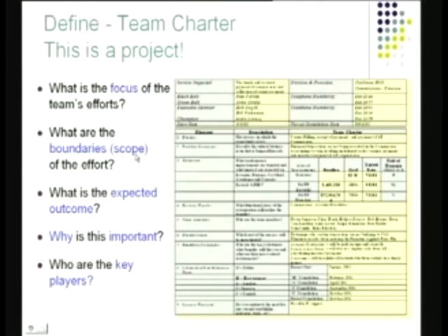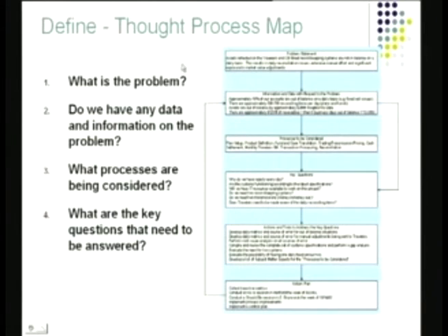That is, what will the project include, what will it not include, what are going to be the expected outcomes, and why this is important, what is really driving the motivation for it, and who are the key players who will be providing the expertise for it. And here's a worksheet. You can read this and you'll get a pretty decent idea of how one goes about defining the team charter.